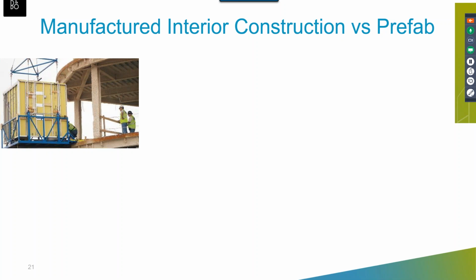So some of you may think of manufactured interior construction as more of a pod. So this picture that we have here, I always picture that it's a bathroom pod because I was responsible for building a residence hall and looked at manufactured bathroom pods for a minute. Think about the lead time on this, how far in advance you need to do your planning to resolve the design so that it can be manufactured off-site, freighted to site, craned into the building while it's still open. So you're making your commitment to this design well in advance of needing those materials on site.